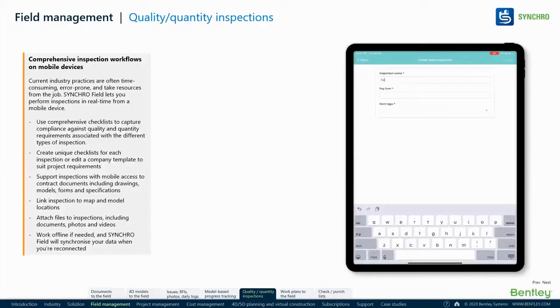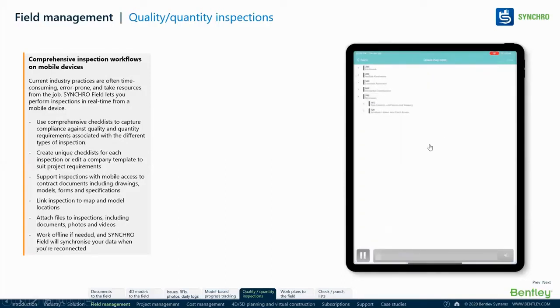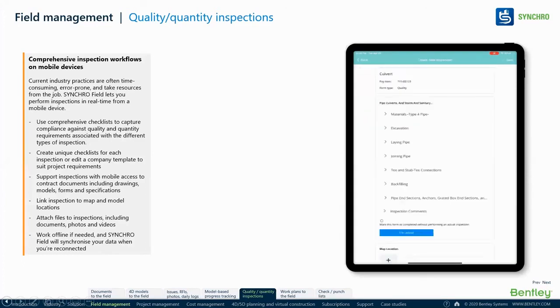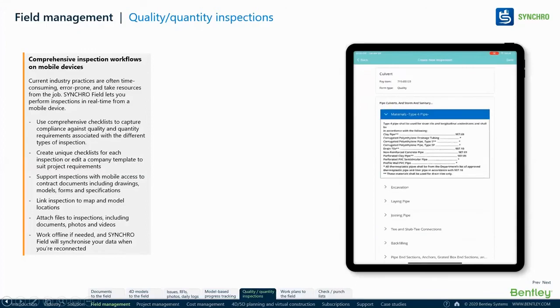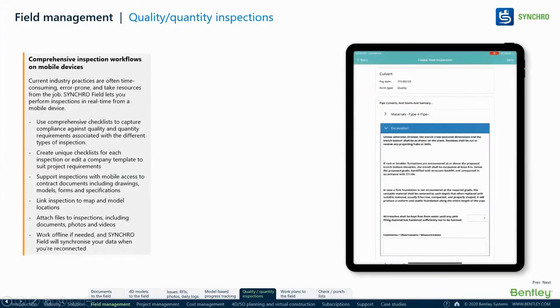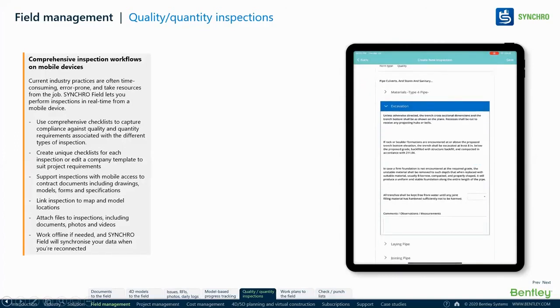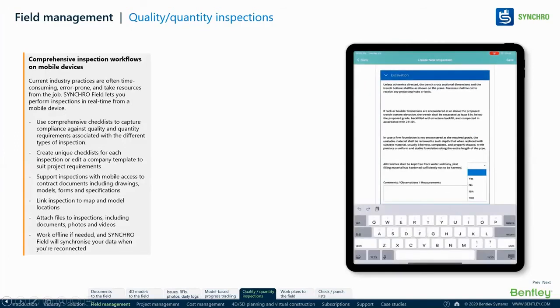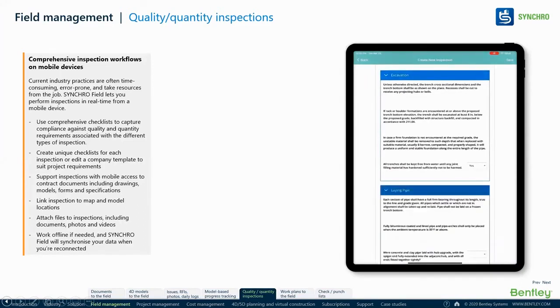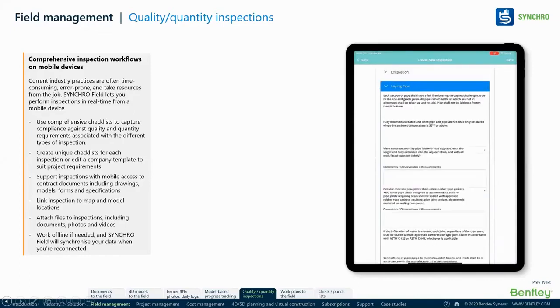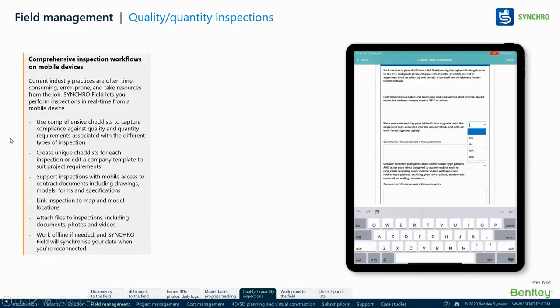Other than that, you can do a quality inspection. Here you can see you can create your quality forms. I want to check my form for the concrete strength, whether it is observed in the site or not. Maybe I am using M40 concrete. What is the strength achieved after 14 days? Or I have instructed in the site to use cubes, so what is the strength after 28 days? That form can be created and assigned to someone who is responsible.